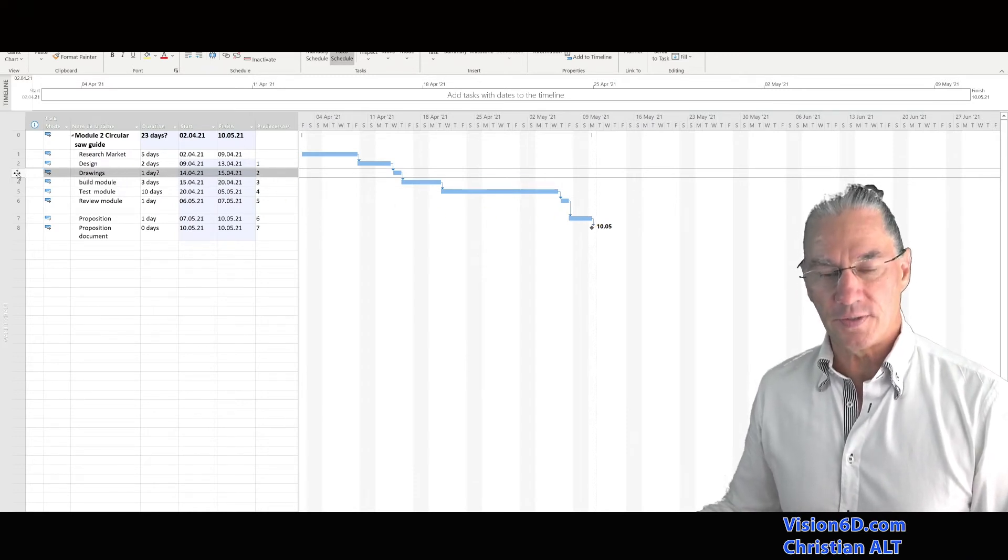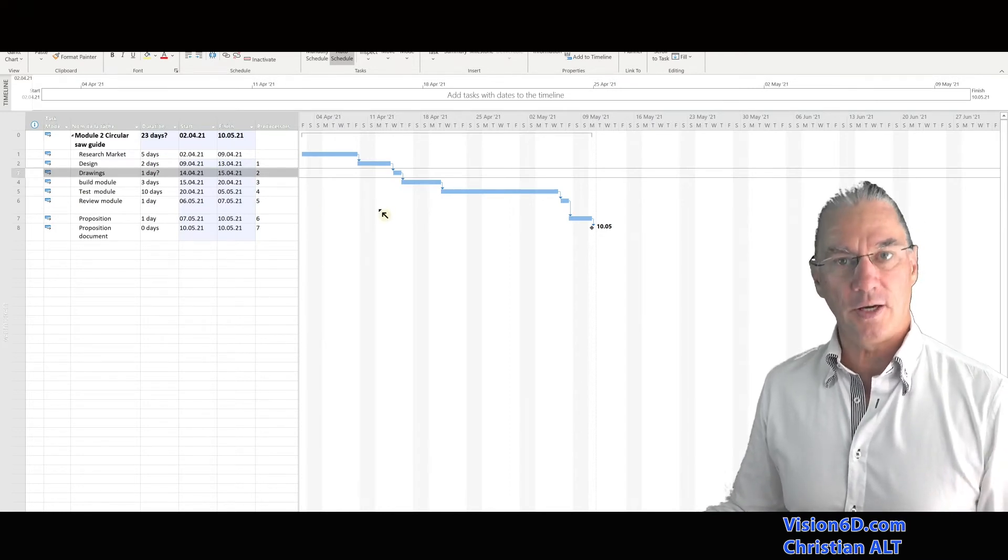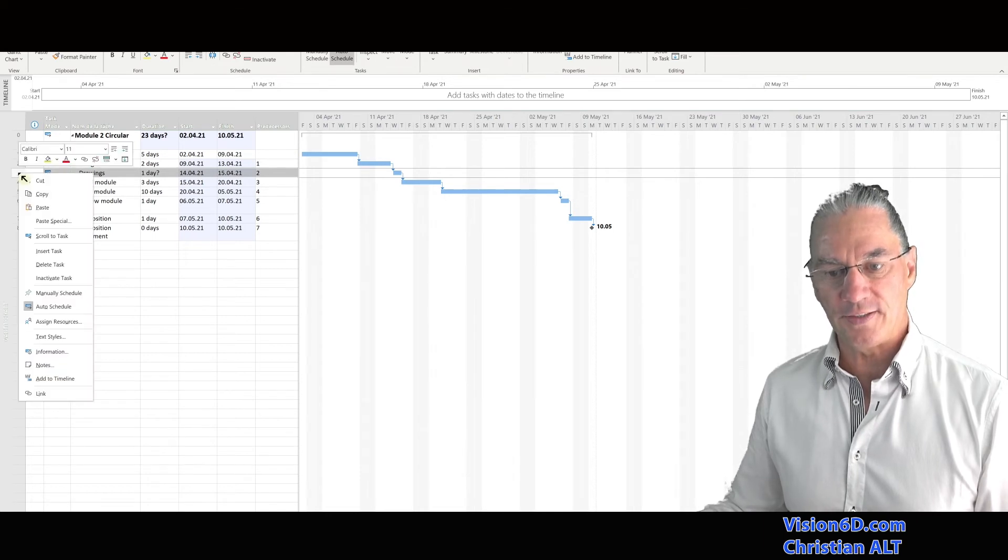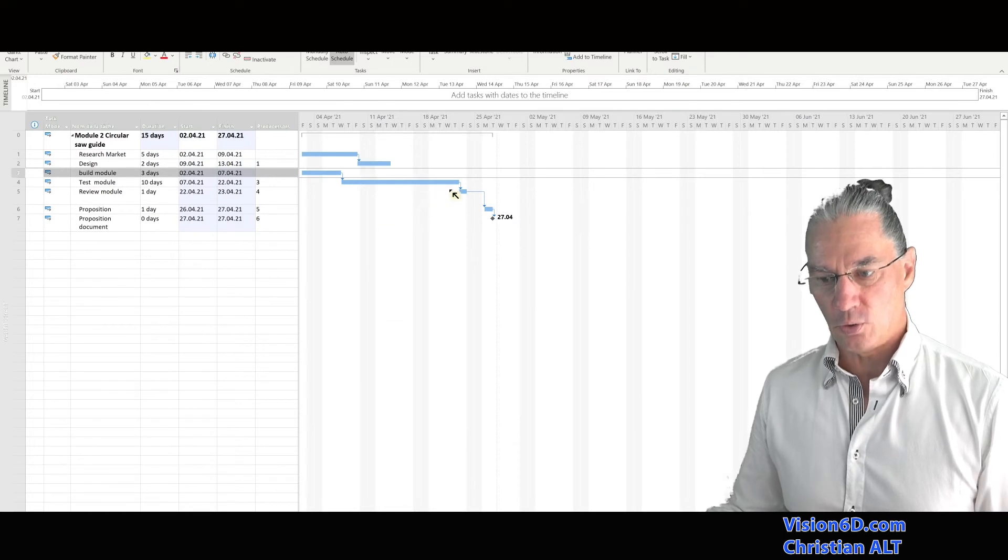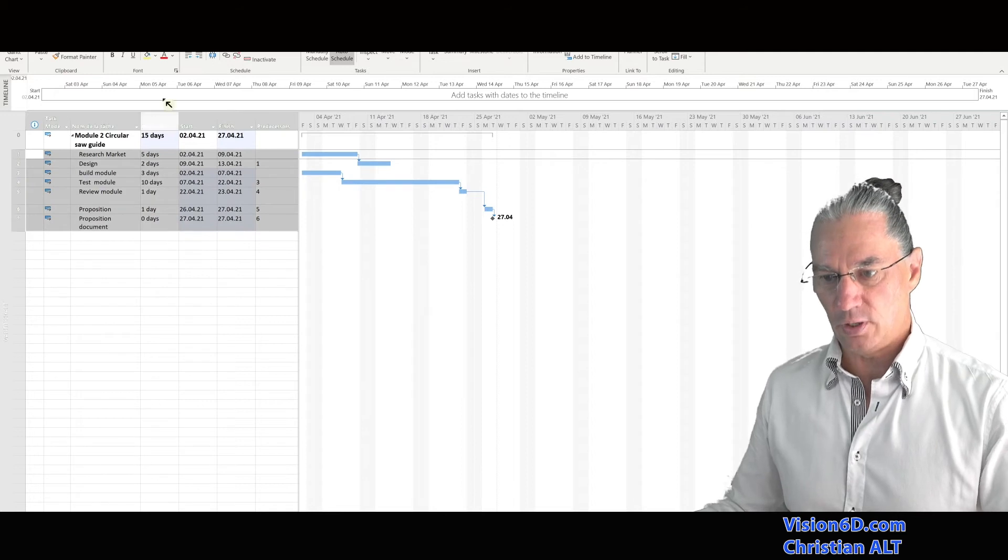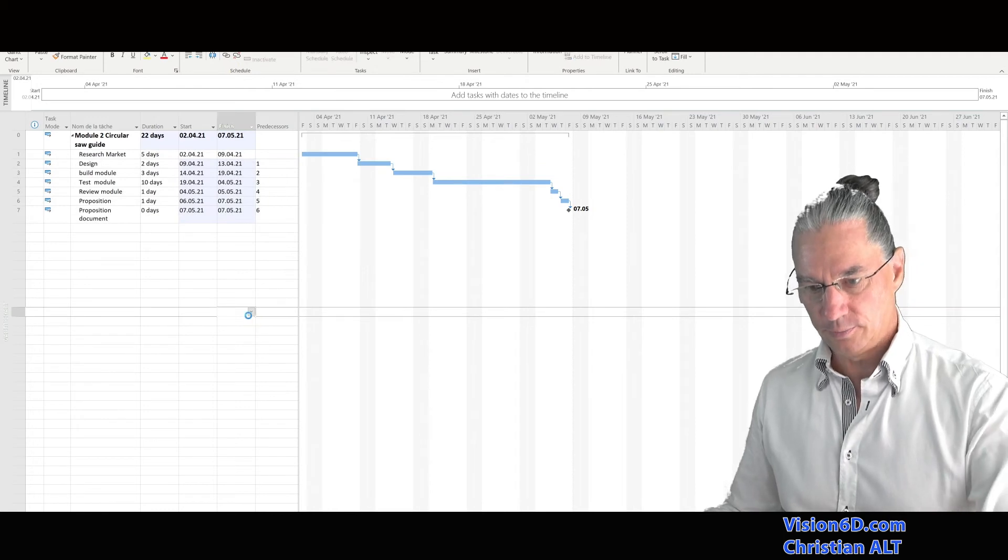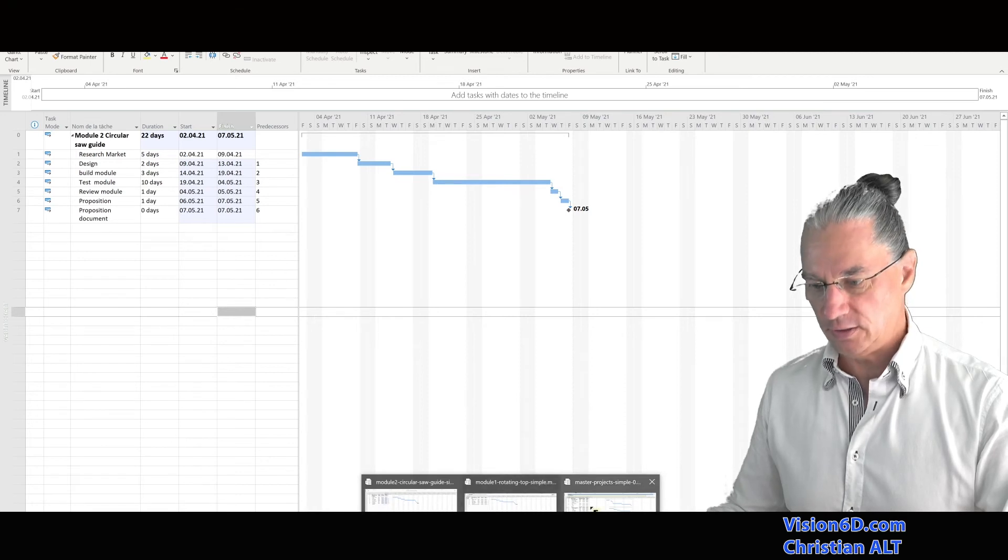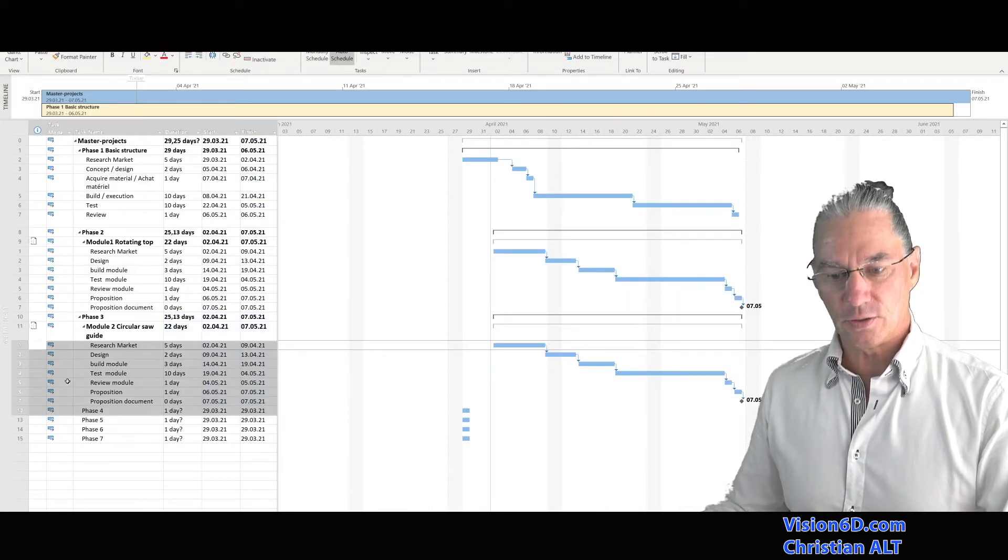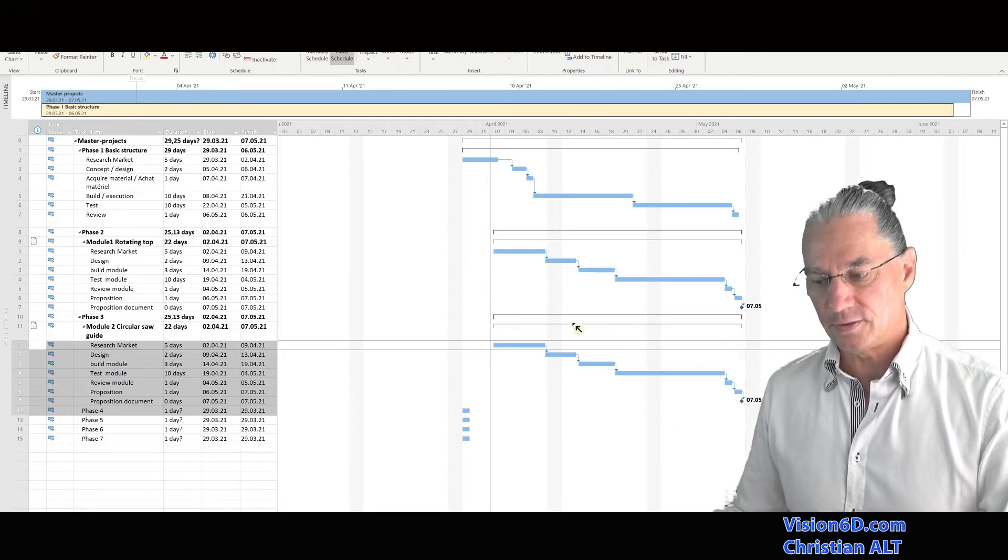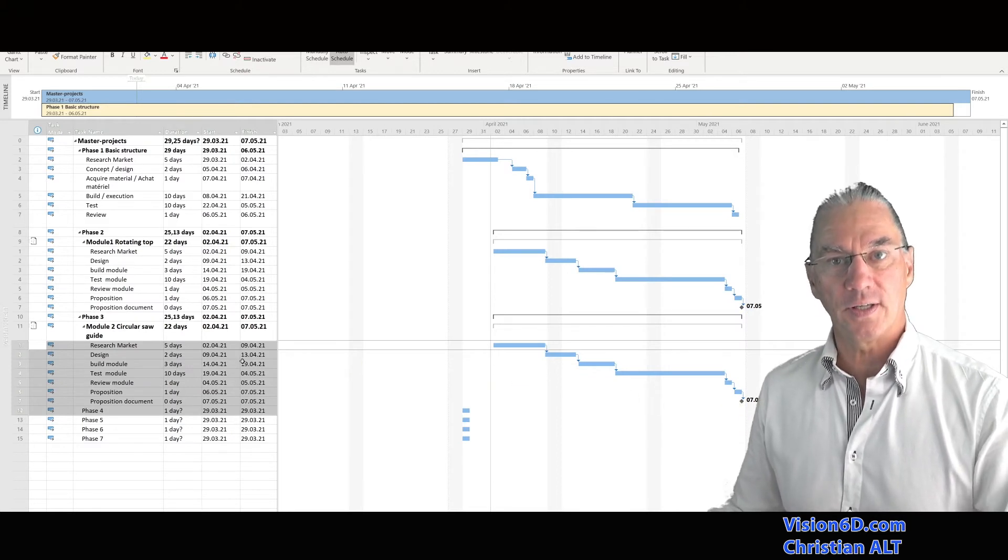Now, let's say that the drawings, it's about the same, but we are going to do it the opposite direction. I'm here in the sub-project and I'm going to delete the task. So once again, here you see that we need to reschedule everything. So unlink and then link everything. We have it here. And we are going to see what happened into the master file. And you see that drawing has disappeared from the master file and that we have correctly rescheduled. So with that, you saw it in both directions.